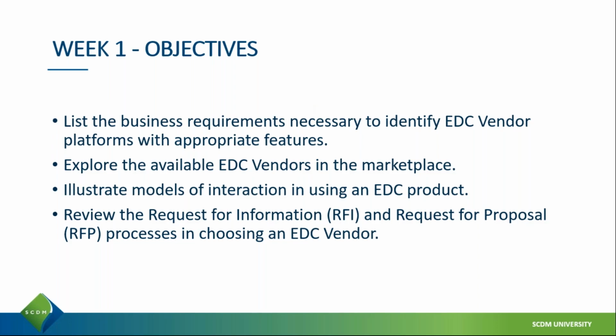Of course, in any process of selecting an EDC or any tools, you have to do what we call a request for information, and also prepare the request for proposal to choose an EDC vendor. So this step is important. During week one, you will have some tools and documents to work on, and as we said, each module is based on discussion and exchange between the participants.